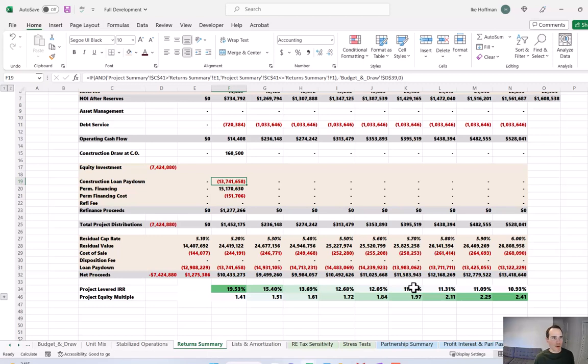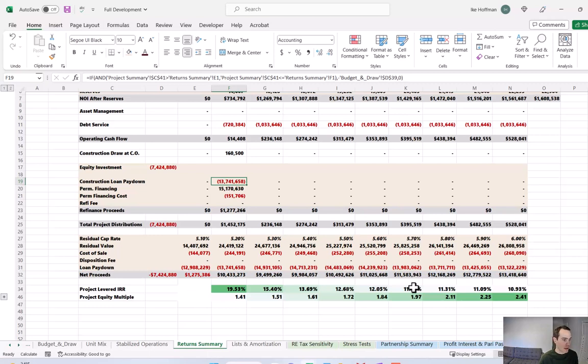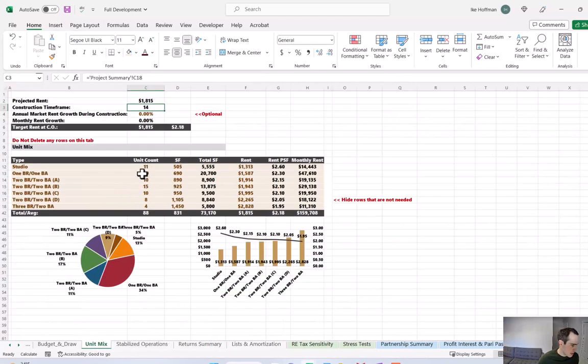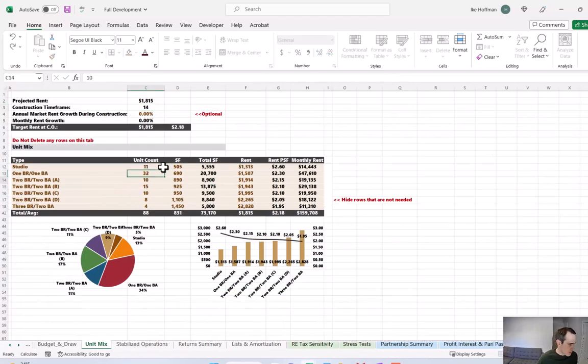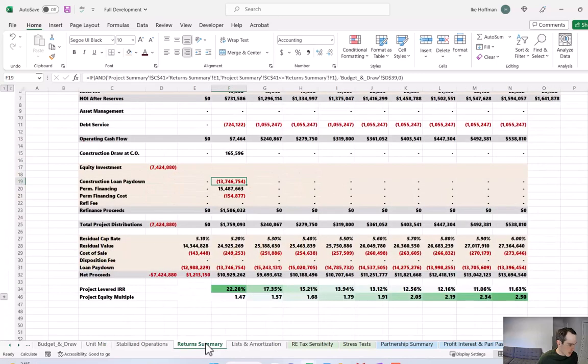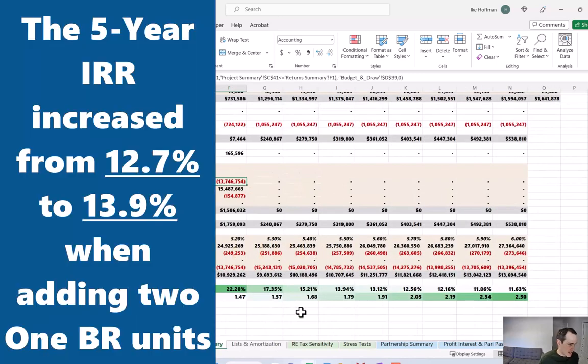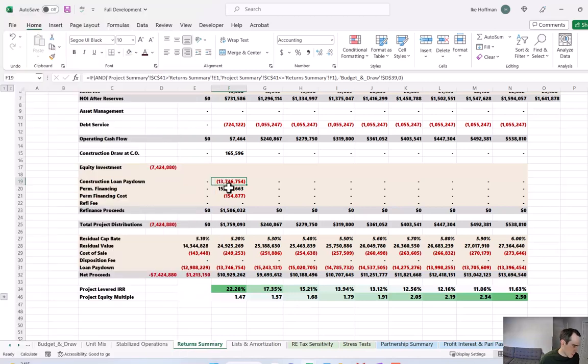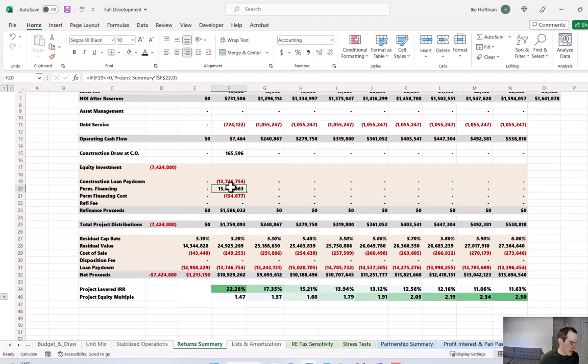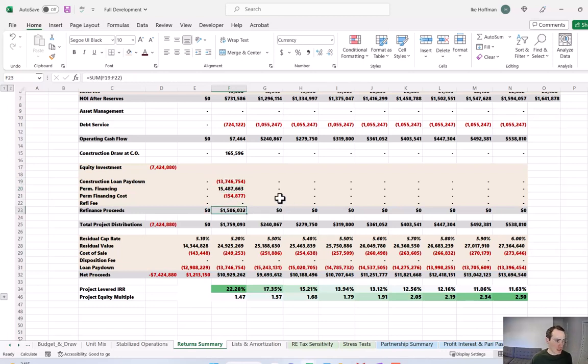We also talked about in video one there might be the potential to add more units. So we're solving for 88 units but what if your architect figures out that hey you can actually fit two more one bedrooms and get up to 90 units. So if we come to the unit mix and plug in 32 units instead of 30 and come back to our return summary we're starting to make a little more progress. That didn't have as much impact as the million dollar discount on the land but there was a noticeable increase in project level IRRs and equity multiples if we are able to add two more units. You can also see that the refinance proceeds are more abundant now. Now there's a nice cushion between the permanent financing and the construction loan, nearly $1.6 million when it was just a couple hundred thousand dollars in our original scenario.